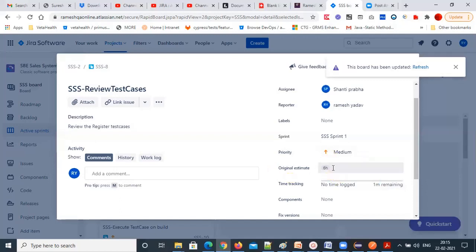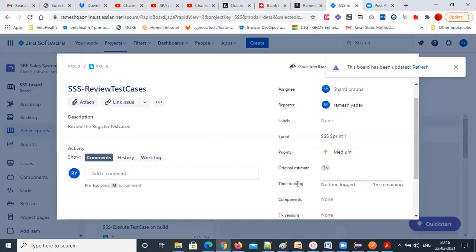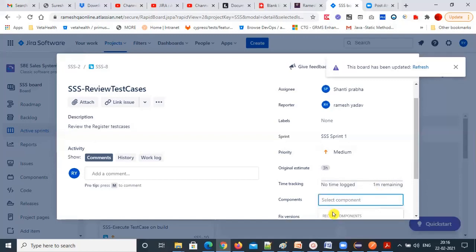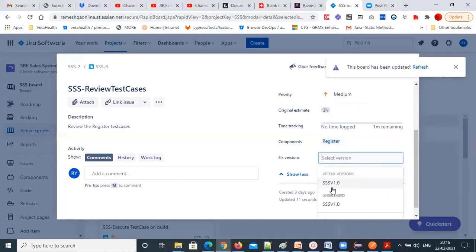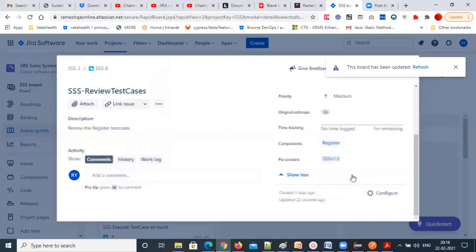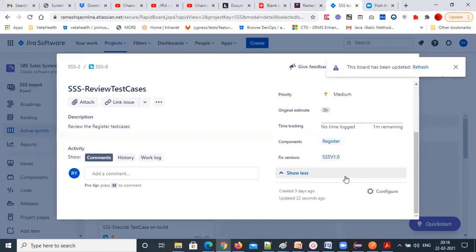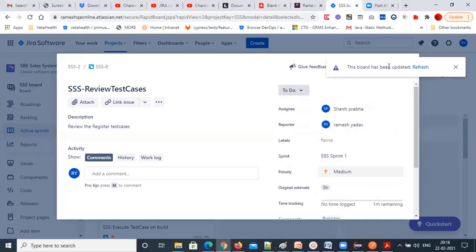Six hours also doesn't take — I'll keep three hours. So three hours I'm giving for review. The estimation is in PRTQ format. The component is 'register component' and the fixed version is selected.